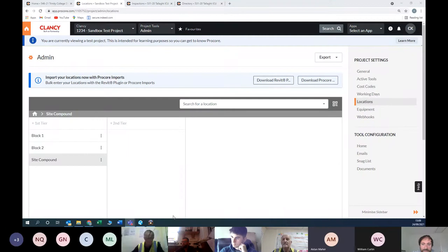I think, Brian, it's very good for checklists as well. If you're closing walls, you want to take photos of the walls, and it brings you right to that location. It's also very good for installing fire doors. You can have a tag on the back of every fire door, and the carpenter can take photos of every door before he puts on the architrave to show the fire mastic around it, and you have your evidence. Correct, very good.